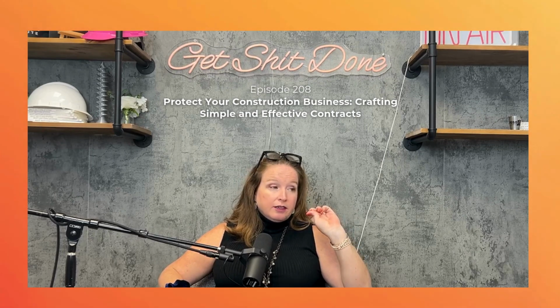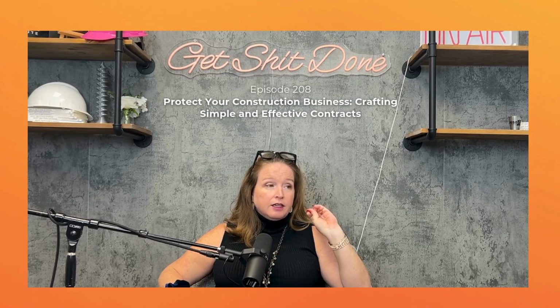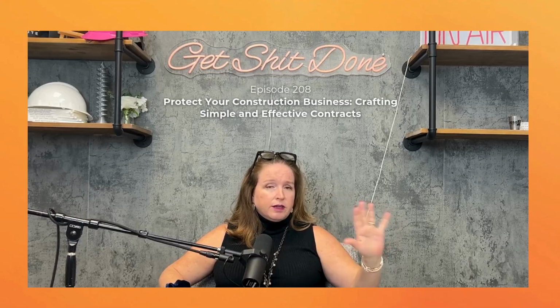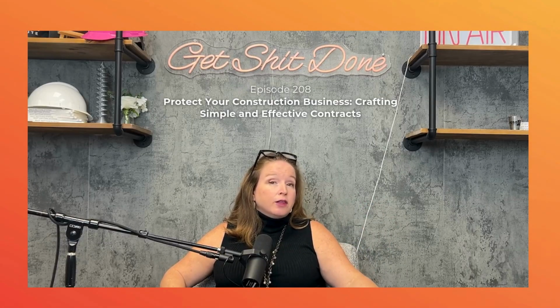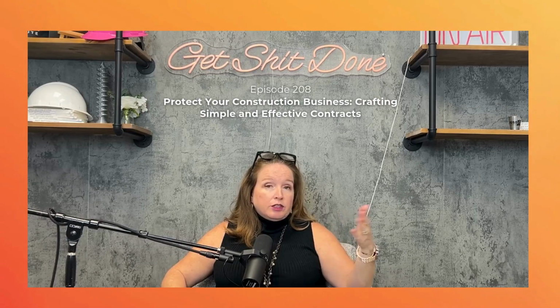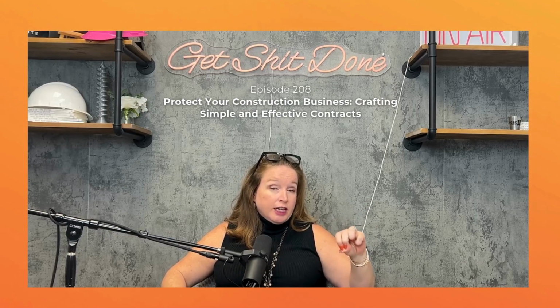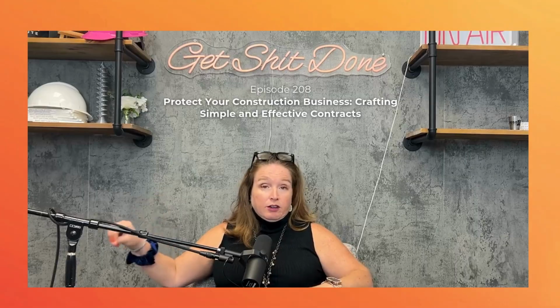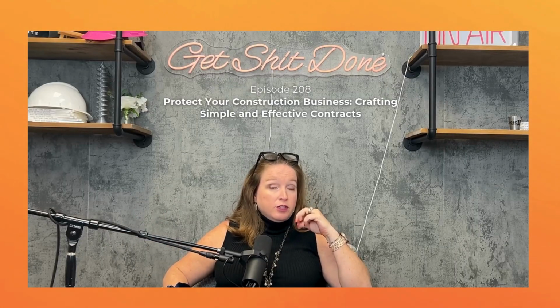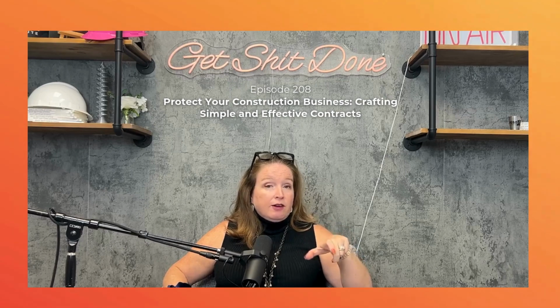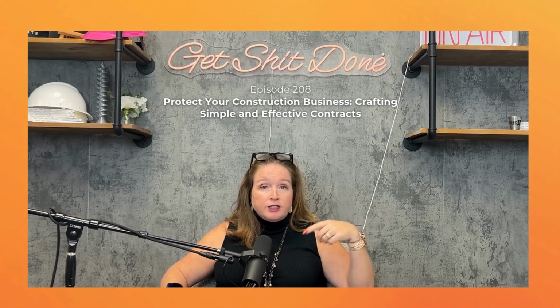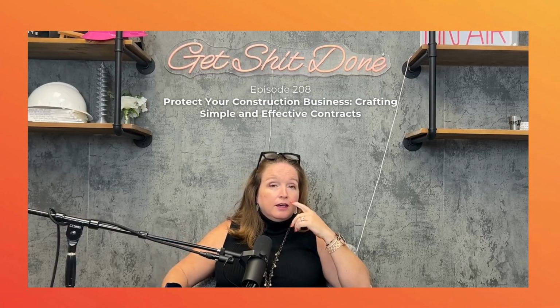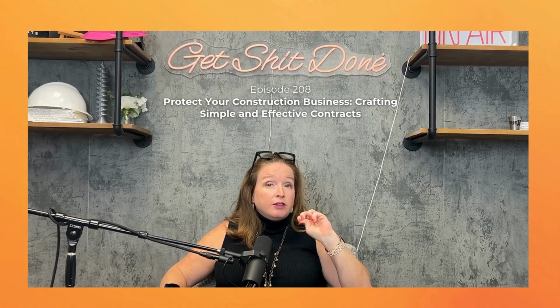So another thing that I've seen in the last couple of years in commercial subcontracts is what's called a change order directive. And what it basically says is that if there's change order work that needs to be done, we agree that it's a change order, and we can't agree on the price of the change order, the general contractor or owner can direct you to do the changes, and then you'll fight about payment later. That puts you in a really bad position, right? Of having to do the work now and fight about it in arbitration or mediation after the project is done. And so we want to be very careful about those provisions.